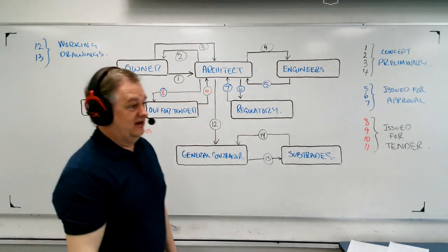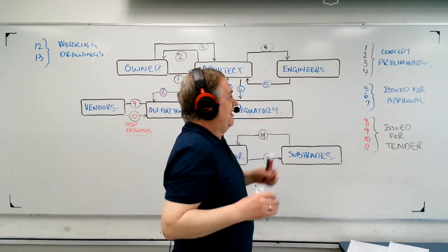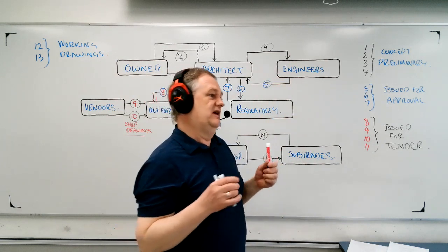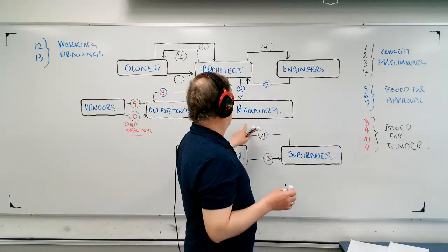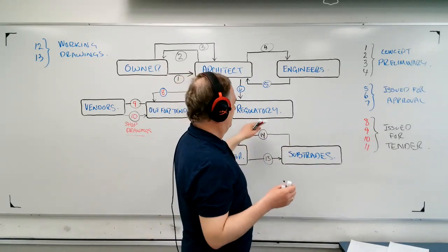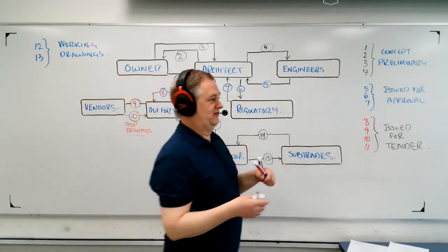It's just that as it goes through the process, it keeps picking up more stuff. When it gets to the engineers, it picks up more technical details and schedules and sections. And then when it gets to the regulatory, sometimes they add documents that get actually put into it, permits and things like that. When it gets to the vendors, they put in shop drawings, right?